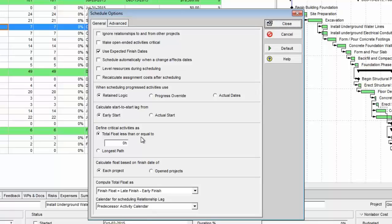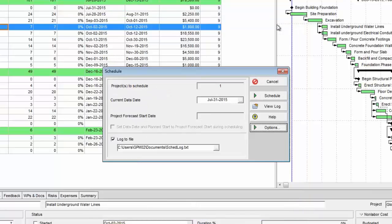One is total float is less than or equal to zero hours, and then the other is longest path. So what I'm going to do is select longest path and hit close.